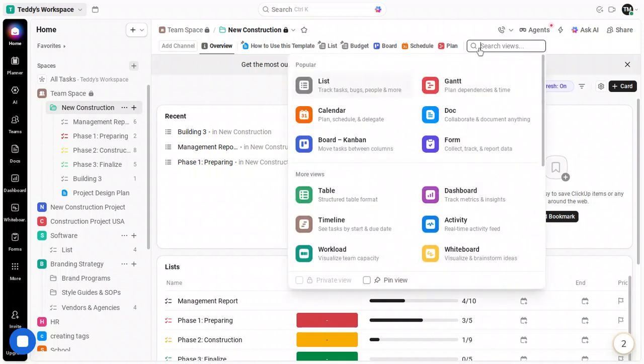The timeline area is where the magic happens. Each task appears as a bar you can interact with. Look for the small yellow dots at the ends of taskbars. Those are your dependency handles. Click and drag from one dot to another task to create a dependency, which helps you control the order of work and avoid overlaps.